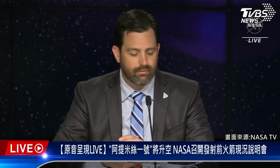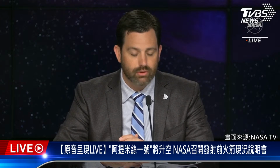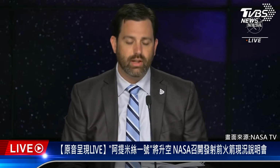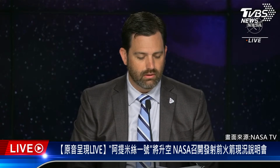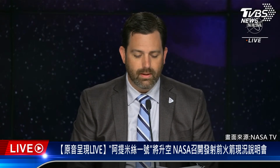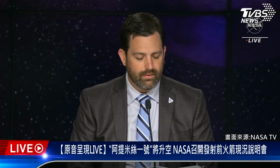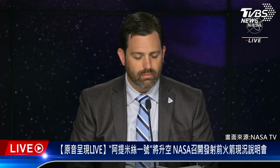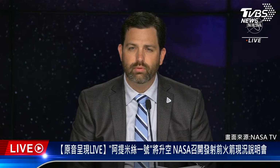Last night, after the briefing, we powered up Orion, we performed all the RF testing, we also powered up the core stage, all looked nominal. We ran final leak checks on the inner tank umbilical, the area that had a leak during Launch Countdown Event 1. Again, all passed ambient along with the tail service mast umbilicals. And yesterday evening, we also completed removing access stands and began final launch preps for the umbilicals.